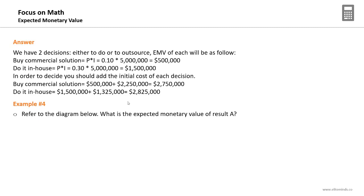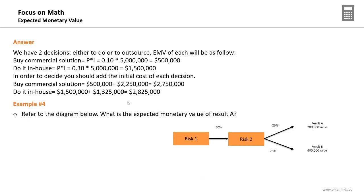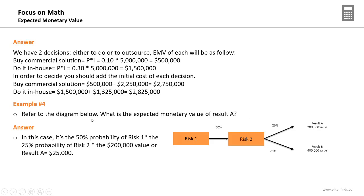Another example: what is the EMV of Result A? Result A has a $200,000 impact and 25% probability — but the trick is you must also consider the 50% probability of reaching that branch previously. So to reach Result A: 50% × 25% = 12.5% combined probability. The EMV = 50% × 25% × $200,000 = $25,000 USD.